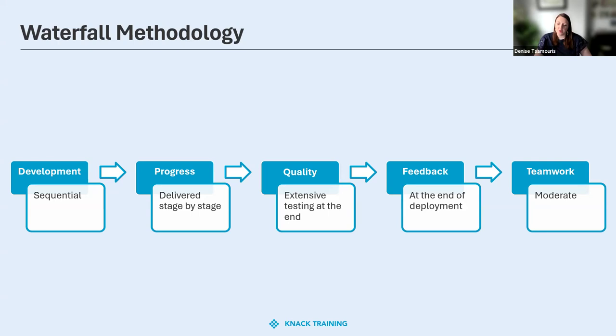So when would you use waterfall? It's a serious debate. Typically, like I said, when it has that linear approach to it, and I'm going to talk a little bit more about an example, but the development is sequential and it's delivered stage by stage. Quality, the extensive testing is typically done at the end. And then you have feedback at the end of deployment. And then your teamwork is moderate. And that is different than an agile. But like Chris was saying, if you have limited staff and time, a great way to do it.